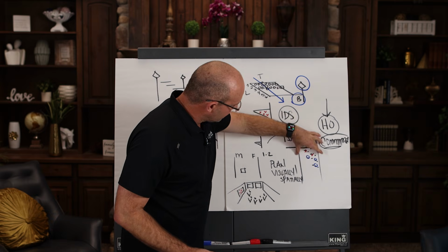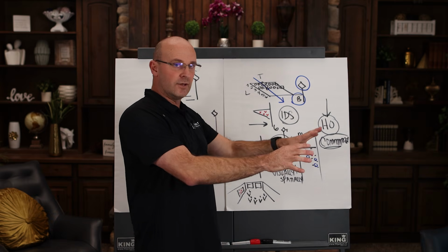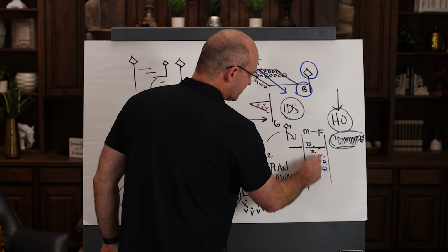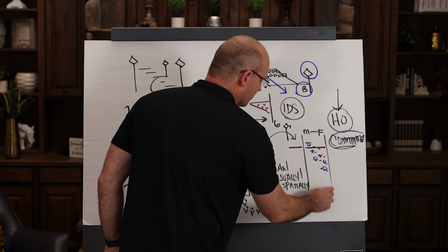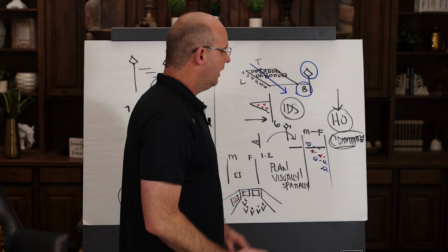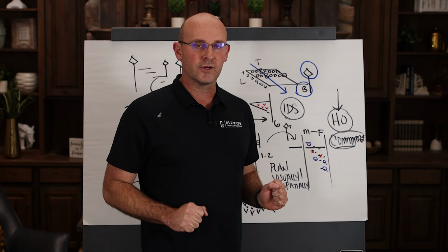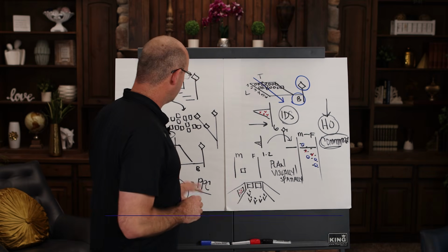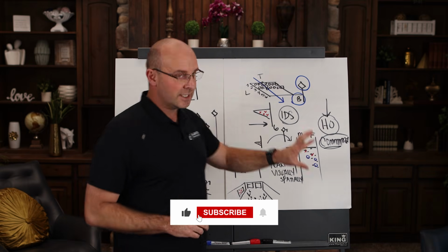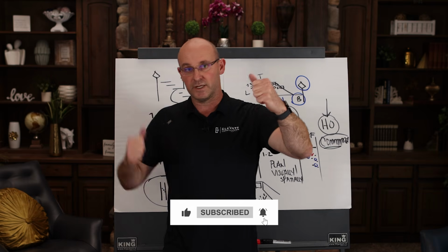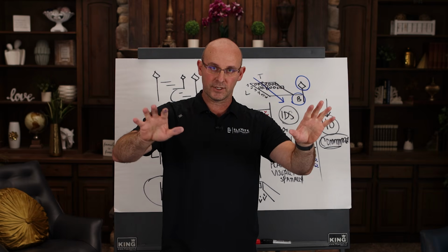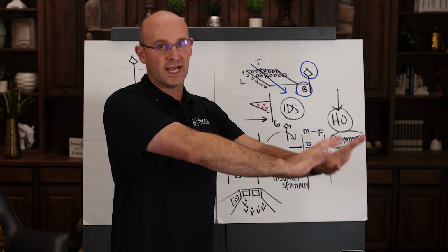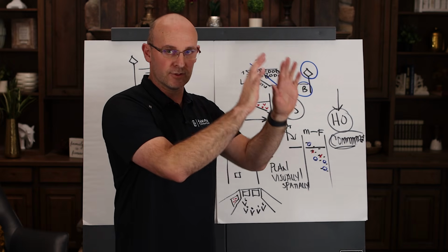And so this weekly work plan is now key for leading work out in the field. And if you're doing it right, you will check mark or X these every day, whether or not you're hitting them, and track that work within a week. From there, you are calculating your percent plan complete, your percent promises complete. But I am going to pause right now because in other videos, I will now take you to the other things like the day plan, the meetings, and the percent plan complete. We're not going to cover that right now, but I do want you to know this is what we're aiming for. This has to go out to the field at a minimum so we can work together.